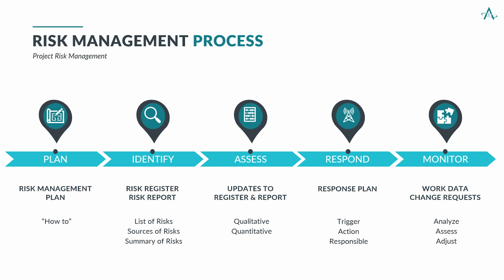Lastly, we want to monitor risks as we're working. We're going to be collecting and analyzing data. Why? So that we can identify when that trigger event occurs. Also, as we monitor, we're constantly searching for risks. Well, anytime a change happens, that change occurs a possible risk. And to track that, we do change requests in project management. And the change request will go all the way back to the second step of this risk management process, and that being the risk register. New risk identified, let's put it down, let's assess it, measure it against other risks, response plan, and then do the whole thing over and over.